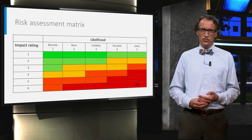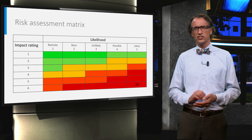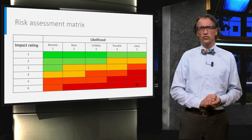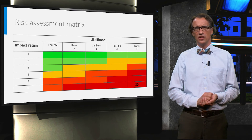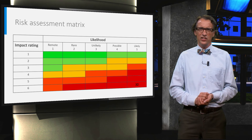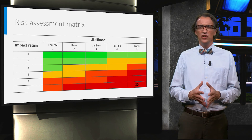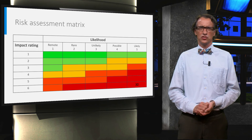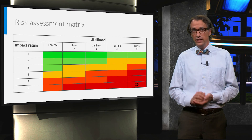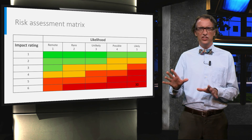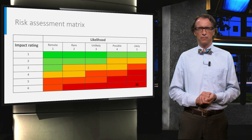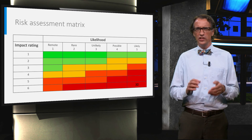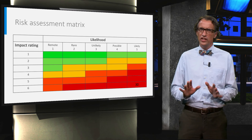To prioritize risks, a so-called risk assessment matrix can be used. In a qualitative way, on the vertical axis the impact of the risks is determined, and on the horizontal axis you see the likelihood of the risk. Here we use a six-point scale for impact and a five-point scale for likelihood. If the impact is high and the likelihood is high, this results in a maximum score of 30. As an organization you need to think about what risks you are willing to take — this will probably be the greener areas.